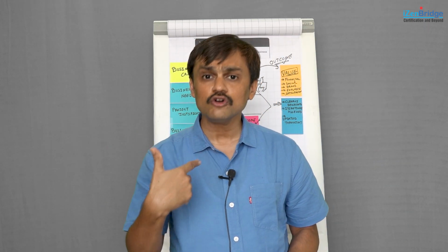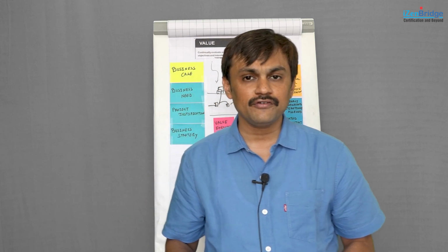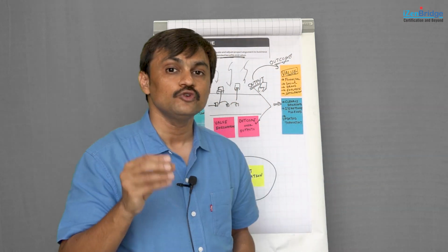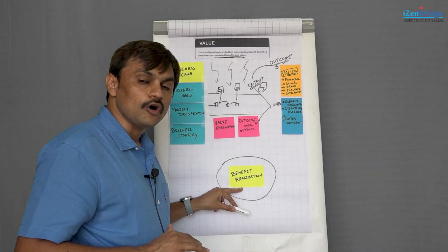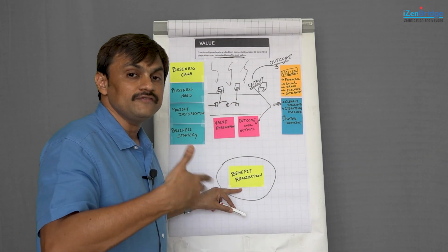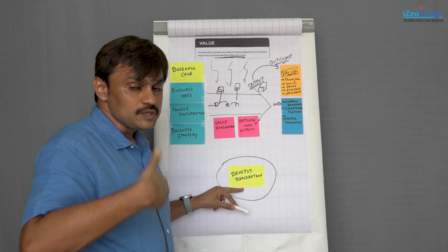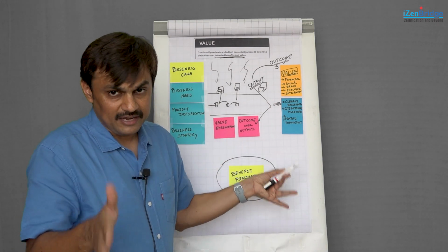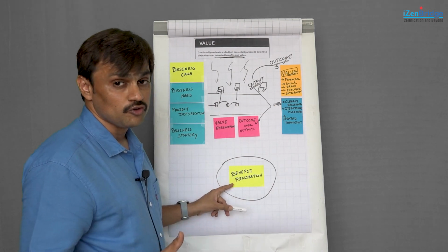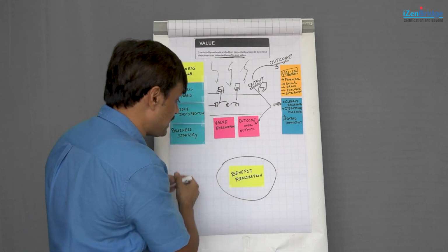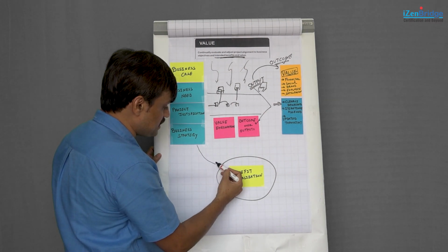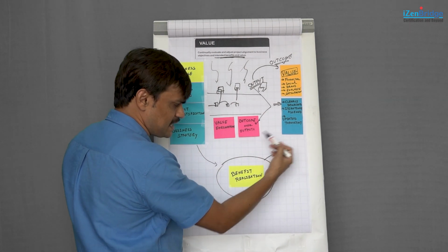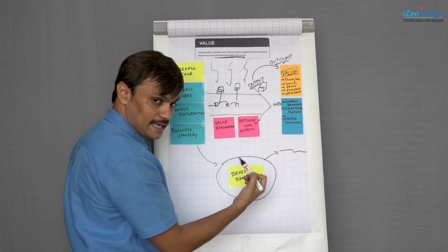When we are thinking of value generation, we need to identify in which time frame the value will be generated. That is a mechanism of evaluating when the benefits are coming and continuously assessing the benefit of a given project. That is the process of benefit realization. Sometimes you have a benefit realization or benefit management plan, which helps ensure alignment between the business case and project execution, and even later on as well.